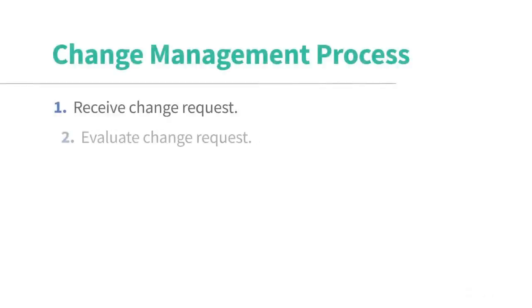Next, someone has to evaluate the request and estimate its impact. As project manager, you can assign this task to someone on your team. The evaluator determines whether the change is needed. If it is, the person evaluates whether the suggested approach is correct or if an alternative would be better. The evaluator estimates the effort and cost the change would require, the impact on the project, and whether it introduces risks.